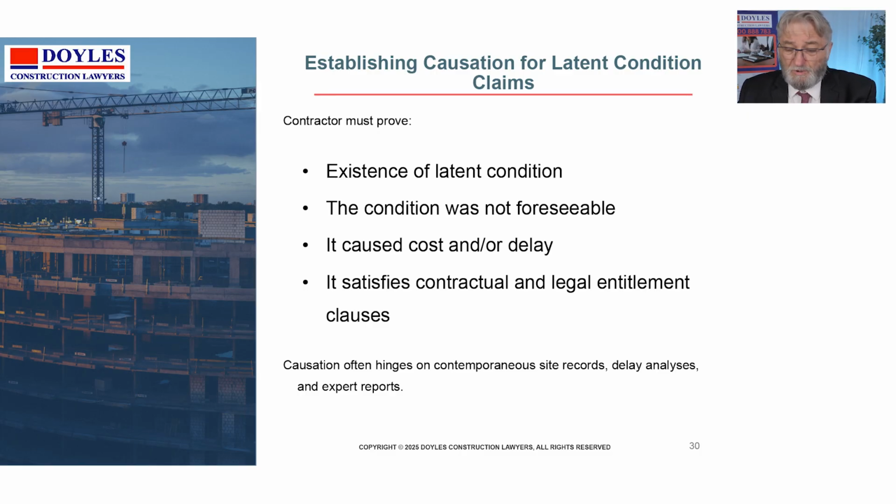And you've got to show that it's caused cost or delay. The concern is you've got to actually show that it had an impact. In one delay case I was involved in, the cause was that somebody deposited a load of rocks on the pipeline. Well, the contractor thought that justified a delay claim from when the rocks went on the pipeline to when they came off. But it was eventually decided, perhaps unfairly, that the delay claim only occurred once he had constructed the pipe to the edge of the rock pile and until the rock pile had gone off, which is a much shorter time. So it's important that you prove the cost and delay involved.